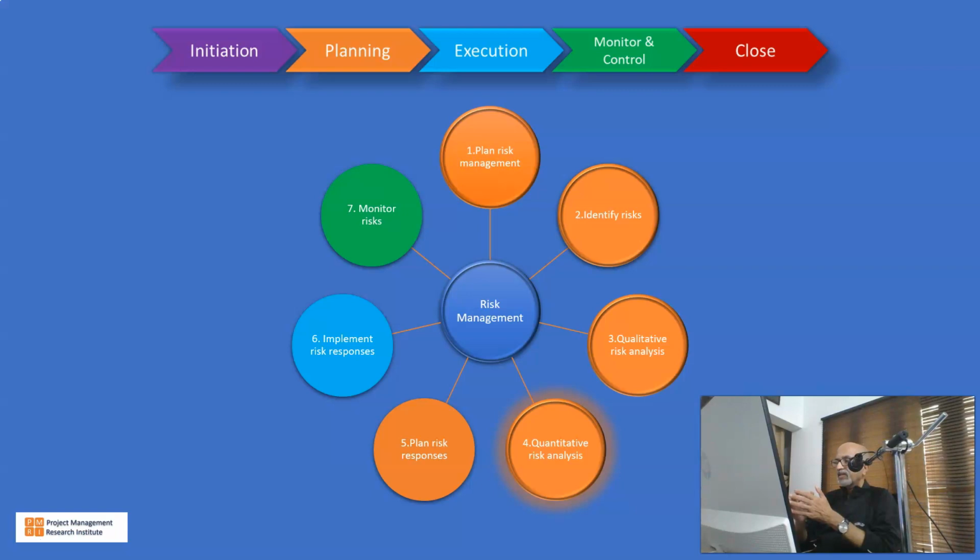I'll repeat again. After risk identification, we have the risk list, and this risk list is categorized in the form of a risk breakdown structure, and within each category, for every risk item we attach a probability and an impact. So the probability scale can be, let us say, 1 to 5, and the impact scale also can be 1 to 5.